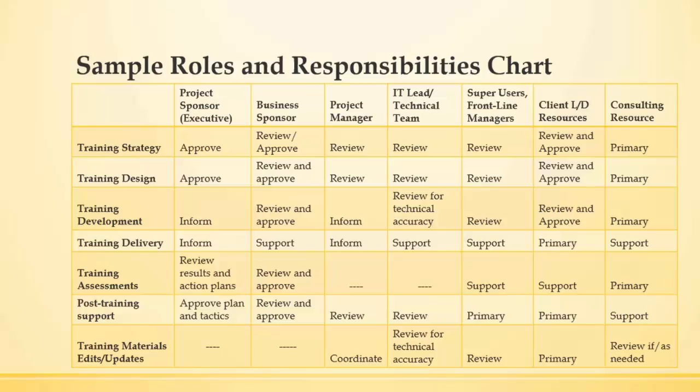I call this a sample roles and responsibilities chart, but it's actually one that I developed for a major grocery store chain when I was on a project up in Boston. We had an executive project sponsor, a business sponsor, a project manager, an IT lead and a technical team, a group of super users, internal client learning and development resources, and then me and all of my people.